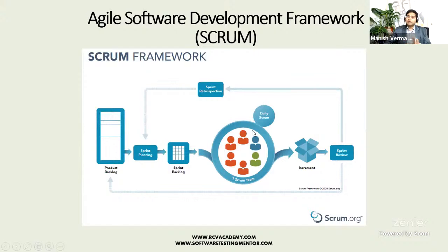So that's the meeting that happens wherein every member of the team will answer 3 simple questions. Basically, what they did yesterday, what they are doing today, and are there any blockers in completing the work or the stories that are assigned to them.